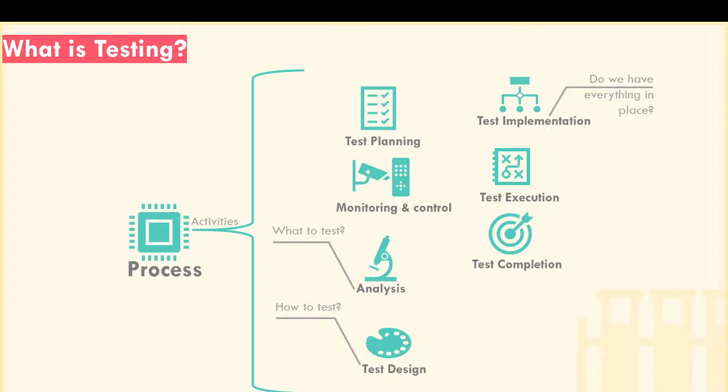So in the test completion phase, you keep everything as a zip so that it can be used. So what is the end goal of test completion? It's analyzing the lessons learned from the completed test activities to determine changes needed in future iterations, releases or projects. So it can be useful for analysis purposes also. So this is test completion, a completion activity, the end activity.